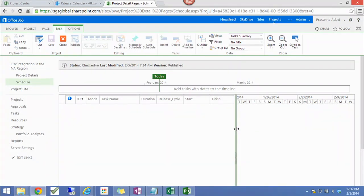It's one of the best practices, and it is also very convenient in 2013 because baselining is available on the web interface. But let me guarantee you, not everybody will do it. And unfortunately, it is not available to set up automatically without some custom coding. So you will always end up with projects that don't have a baseline. Anyway, we covered that scenario also by using a task level field. How do we pull the whole thing together?